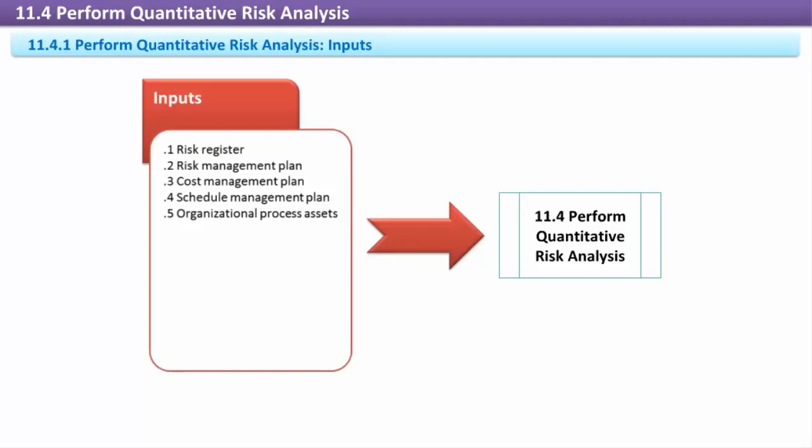Inputs: Risk Register. The risk register is a comprehensive list of all threats and opportunities the project faces. It also contains supplementary data about each risk, including its impact, probability, risk response, budget, risk owner, and contingency and fallback plans.